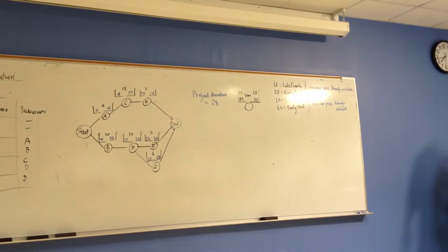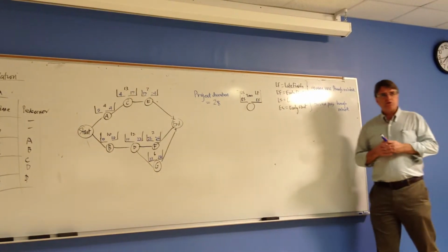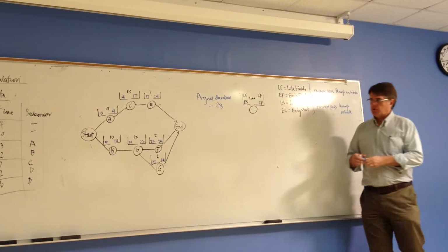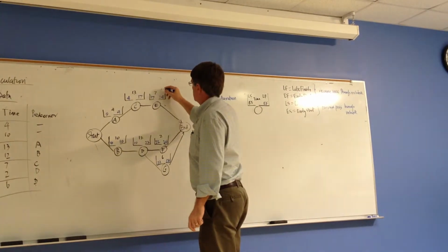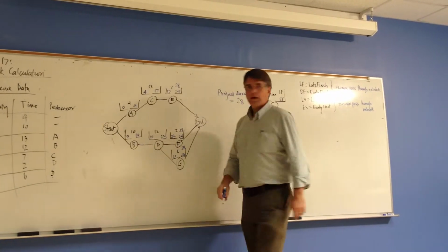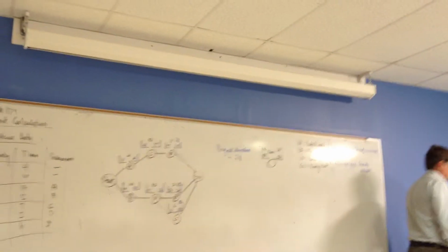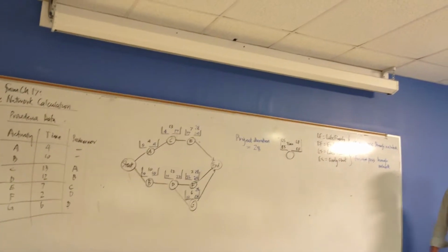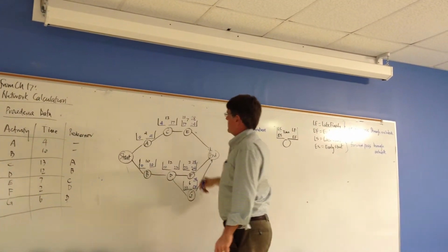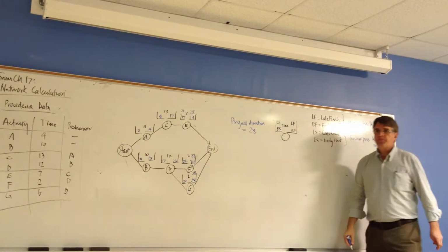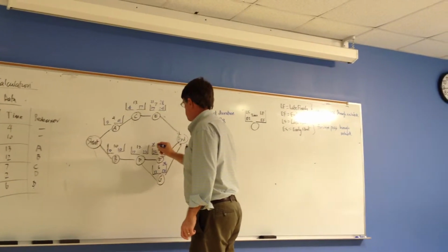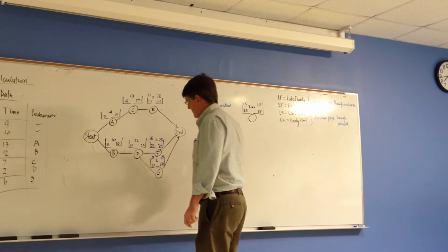Okay, so by convention, I'm going to take as the late finish on all blocks connected to the end block, the project duration. So that's 28. Okay, that is by convention. And then I'm just going to deduct and I'm going to go through. So if I did finish at the latest at 28, it means I could do a late start at the latest by 21. And this one here would be a late start of 26. And this one a late start of 22.